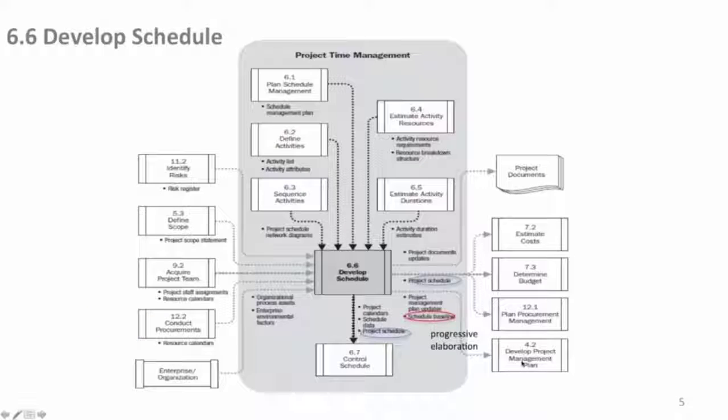So yeah, project schedule, schedule baseline. Oh yeah, I should mention that the schedule baseline now is a product of the developed schedule. I mentioned this earlier. Here's project schedule, as we said, goes two places, out internally and externally there. And the schedule baseline is at any point in time, if you baseline it, your project schedule, you're putting in actuals as you go along. Did you do this? Yeah, I'm 10% complete. Okay, fine. I put 3 hours on that. It takes 10. Okay, you put 3, partially complete.